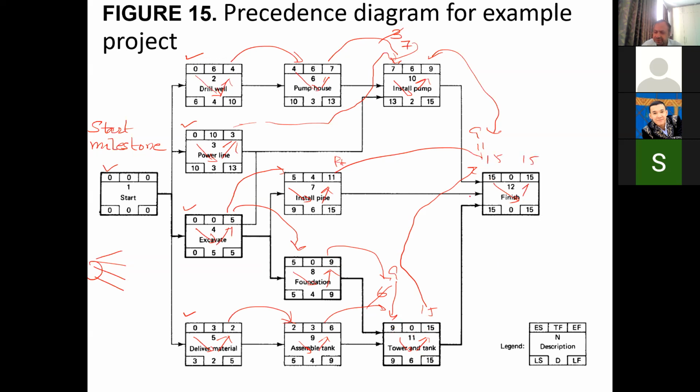Of course, this is not an activity. This is a finish milestone. Although representing the start and finish milestone is not necessary, it is always advantageous because it creates clarity in the picture. So this is how the calculations are going in this way.